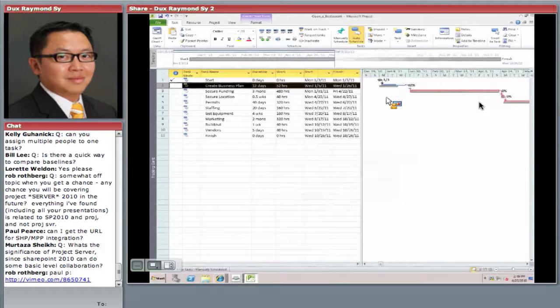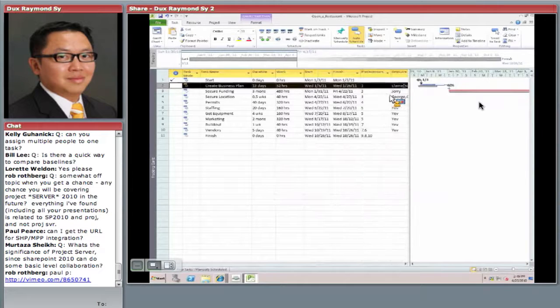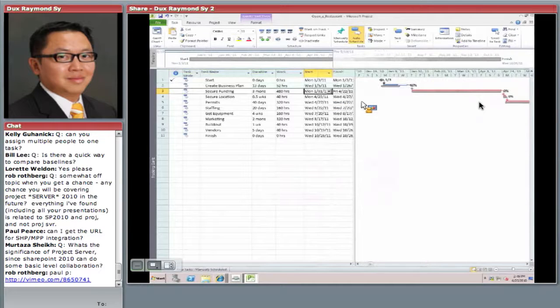So notice that the task slipped, but the whole project hasn't slipped. Just to refresh everybody's memory, the project has not slipped because Jerry can't start the next task until the 31st anyway. He's on vacation, remember? So we're still cool. We're still good with that.